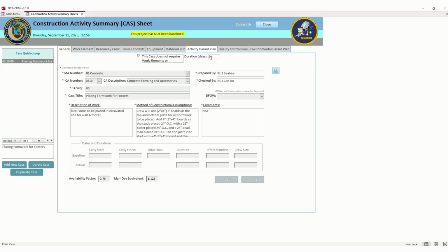What a duration or milestone will help you with is this: is this a contractor or not a contractor? If it's work we're doing, then we don't have to necessarily use it as a duration. This will mostly be for HVAC, fire suppression, anything else that's out of our control. You can put that it's going to be done by others. You would write down here, being done by contractor. And then you could put the number of days it's going to take for that contractor to complete the task. Whether it's 45, 60 days, 2 weeks, 1 week.